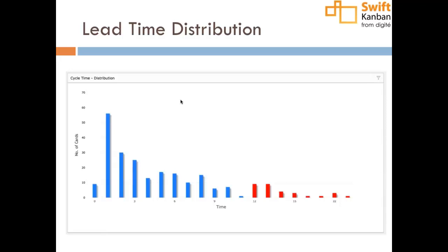If you keep your people 100% deployed on useful work, you reduce the WIP and you control the variability in lead time, okay, you're in heaven, basically. So the actions you take to make these happen can be varied and context dependent, but if you look at your next 3 months cycle time chart, and it looks like it has a much better tail, you have improved.